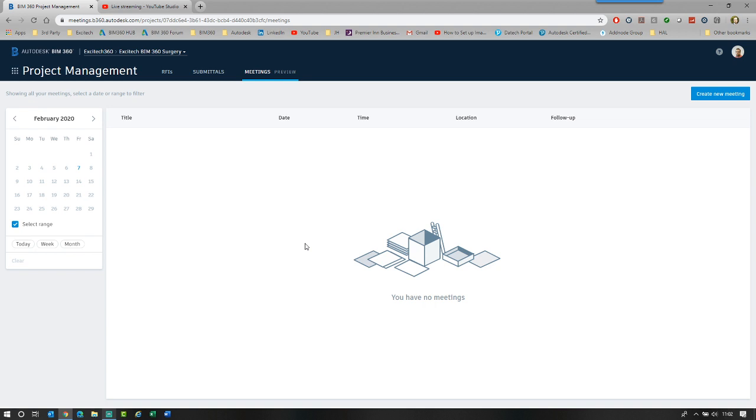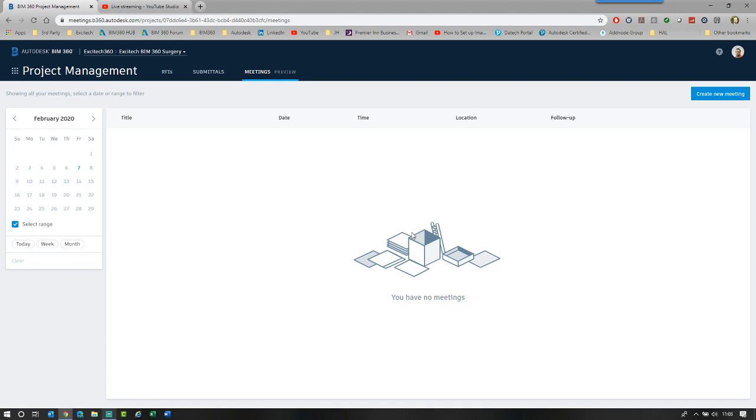A couple of rules around how this works. In this project, I'm the project administrator. As a project administrator, I will see everyone's meetings and agendas. If I'm a project member, I will only see the meetings and the agendas that I organize. If I'm creating a meeting and I don't want other people to see it, I simply don't invite them to the meetings.